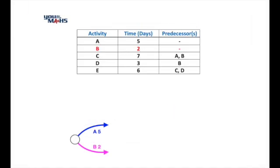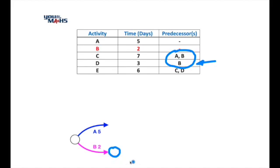We can identify the conflict in the predecessors column. Activity C is relying on A and B, but activity D is relying on B only. So we go with the lesser dependency: activity D is only relying on one predecessor. We place a node at the end of activity B and draw D coming off that — task D requiring three days. That fits the table: D requires B to be completed.